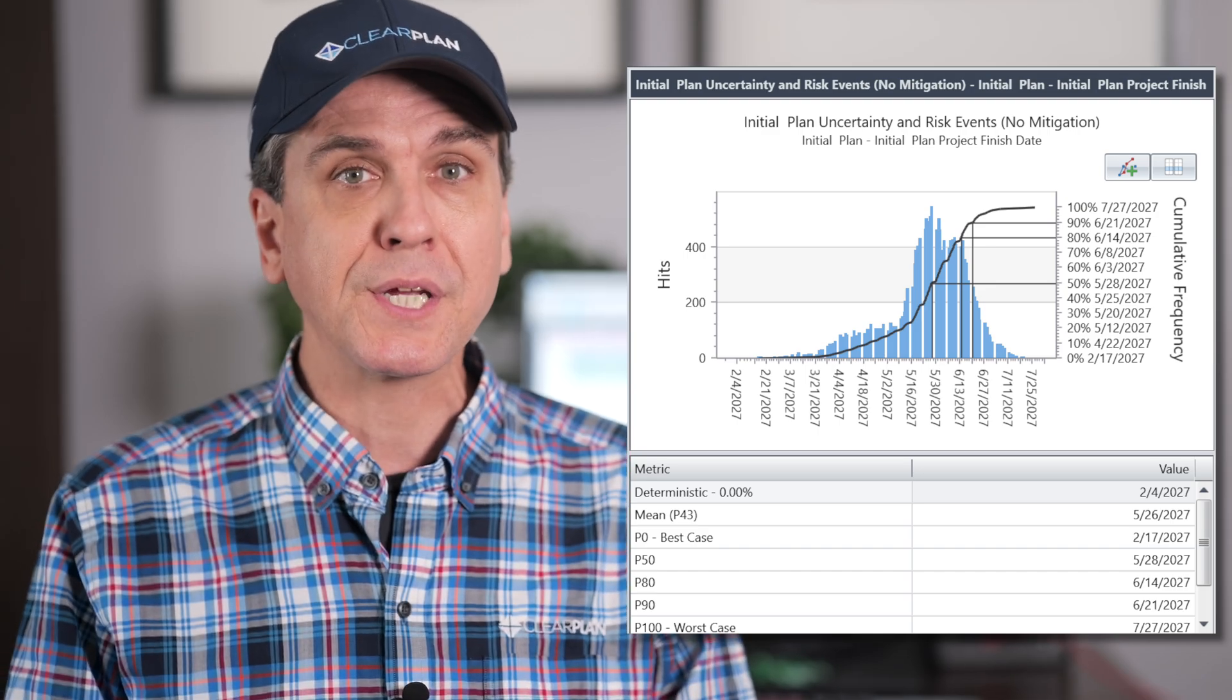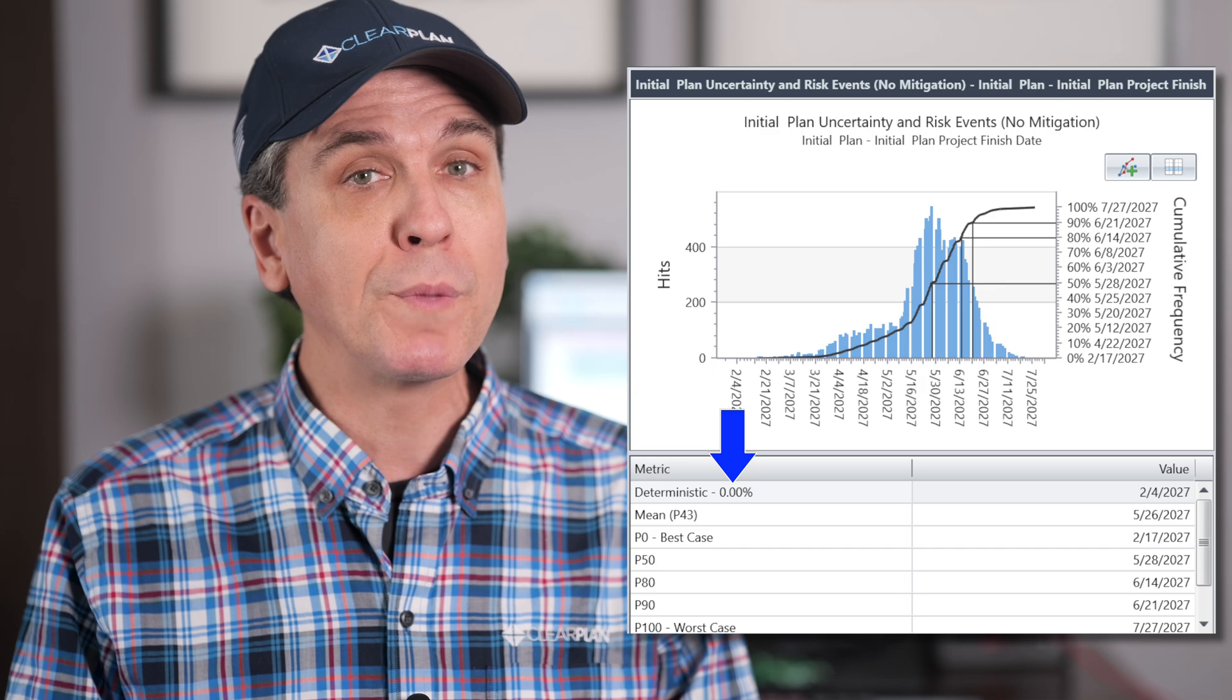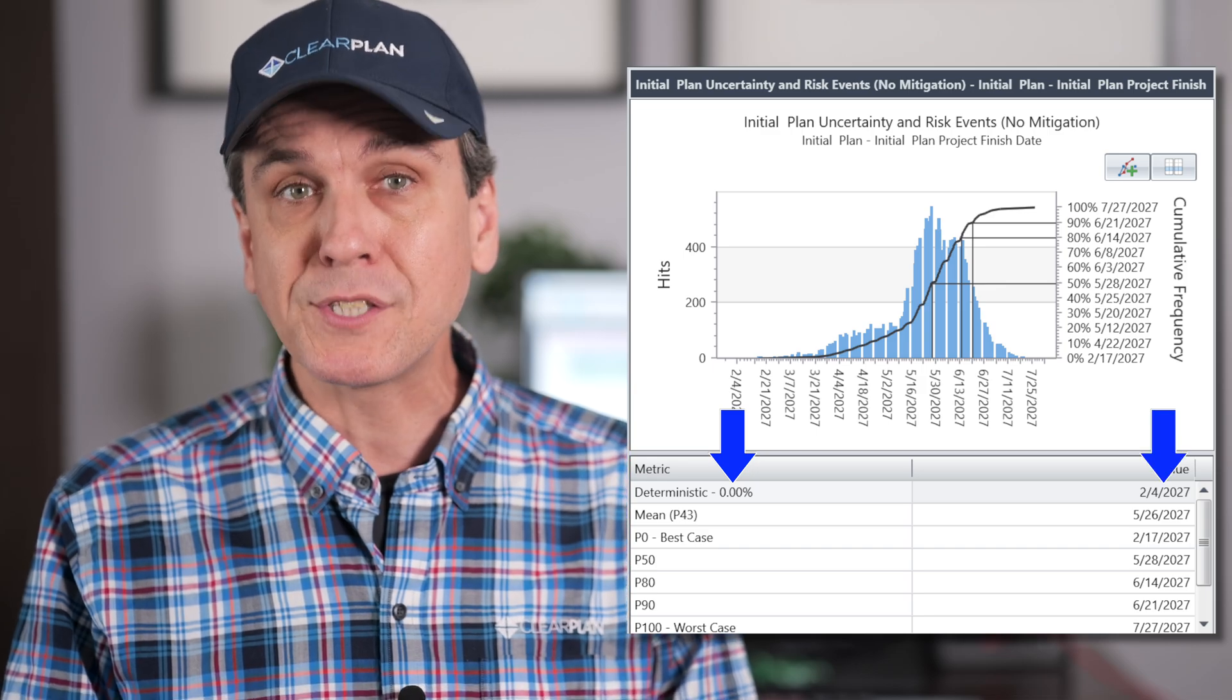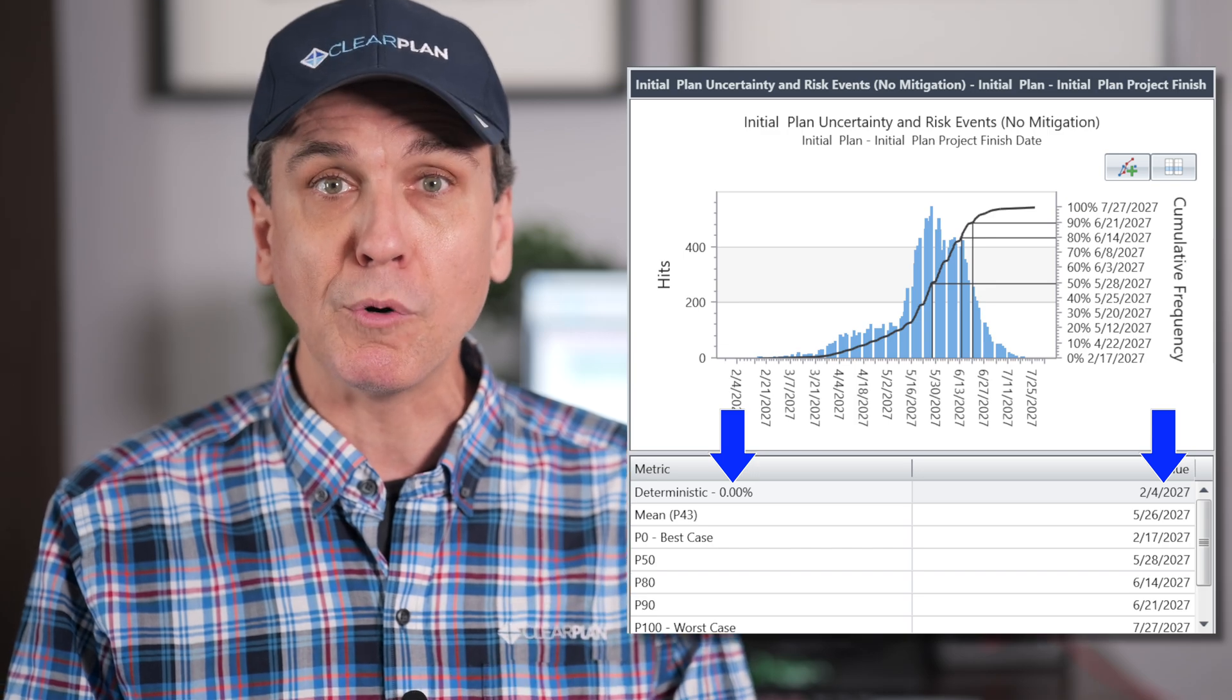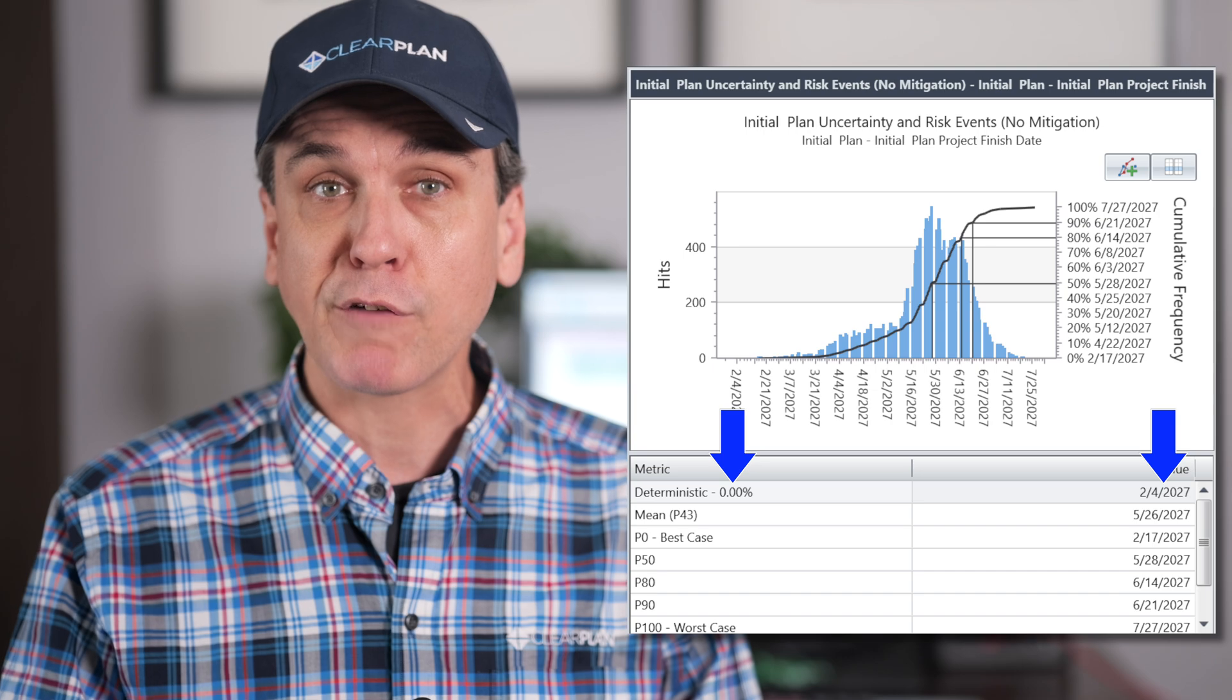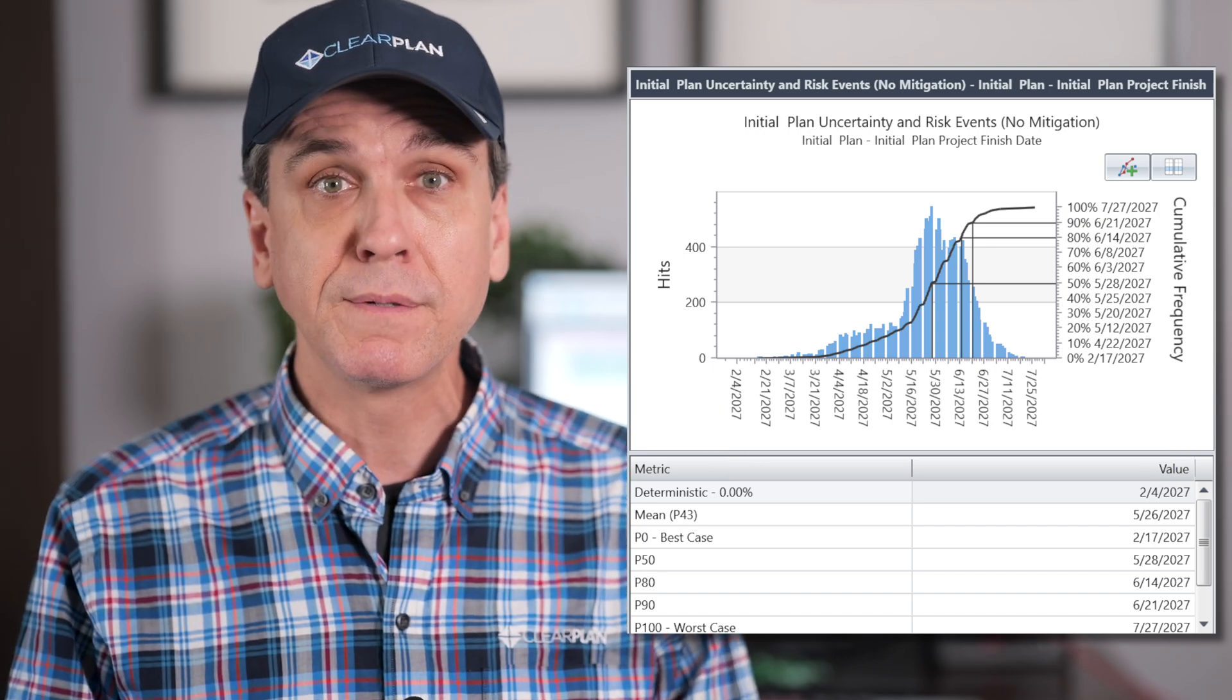One more statistic is the p-value for the deterministic finish date. This deterministic date is the finish date from your project planning tool, such as Deltek Open Plan, Microsoft Project, or Oracle Primavera P6.